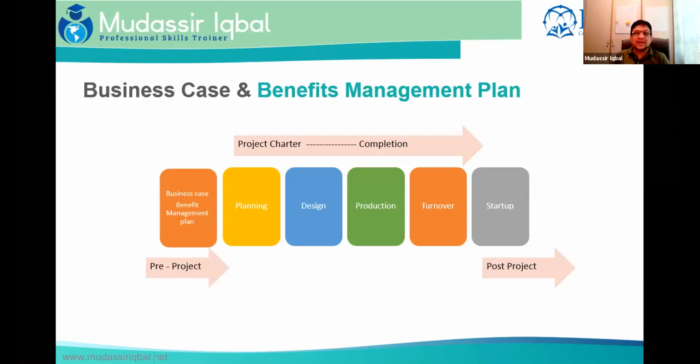So the project charter takes the right information from the business case. The business case is a bigger document. It has a feasibility study. It has the context. It has other information. But you take the information. Maybe a business case is being created or a benefit management plan is being created, and you have two or three projects initiated from it. So the project charter for a specific project only takes the right information: this is the project, this is the end game, this is the risk, this is the ballpark figure in terms of cost and time. These are the people who are going to benefit. The project charter signifies that the project has been initiated.